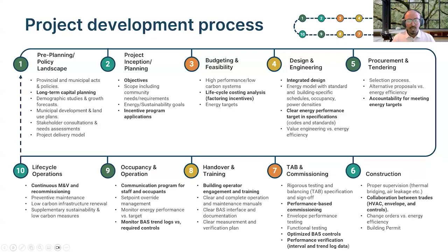And when we go into handover and training, we've got the building operator engagement and training. One of the most important things we think is making sure that the people that are operating the facilities understand why these systems are connected the way they are. Why are they set the way they are? What is the intention? What is the logic? What are the fundamentals behind them? So when they want to make changes, they understand the best way to make changes.